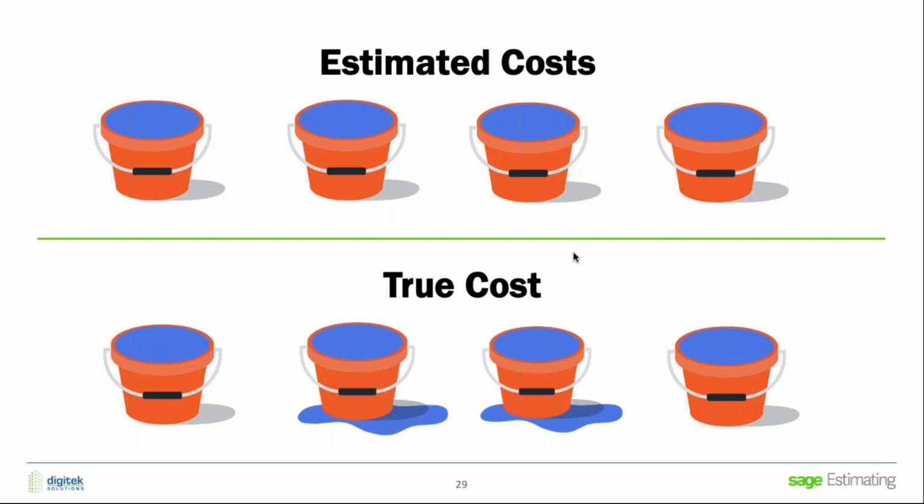So on the next bid, we can say, look, our labor was too high here, our labor was too low here, our materials, maybe we needed to adjust them a little bit. Material costs usually aren't the issue, it's usually labor. And that's where we need to focus: where is that production happening, where are we losing productivity, where are we gaining productivity, and build those repeatable systems within our construction company.